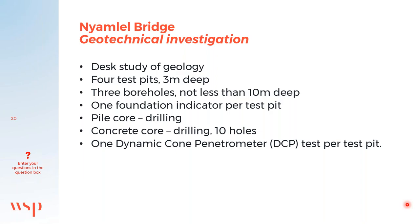A geotechnical investigation was also conducted, entailing the following: a desktop study of the geology, four test pits that were three metres deep, three boreholes not less than 10 metres deep, one foundation indicator per test pit, pile coring, concrete coring with a maximum of 10 holes allowed, and one DCP test per test pit.